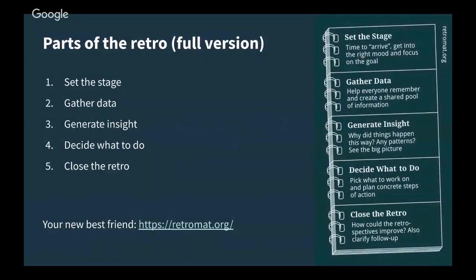So, parts of the retro. In theory, if you're doing sprints that last for 4 weeks, a retro should last about 3 hours and have all these 5 sections.